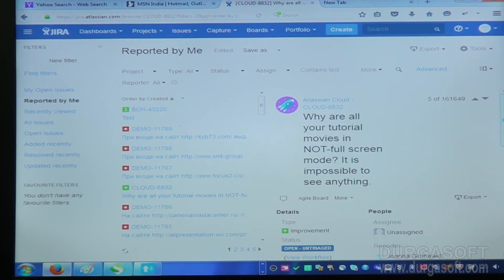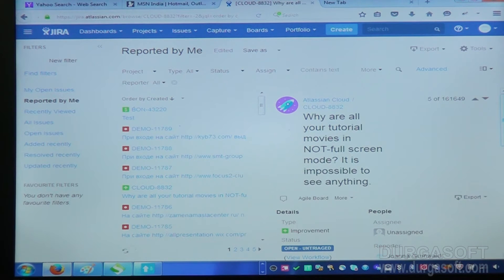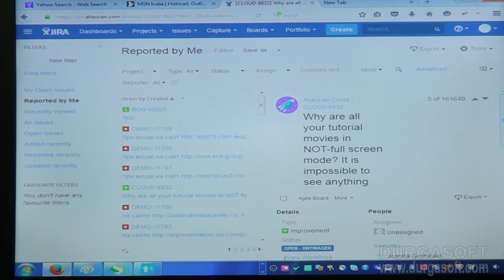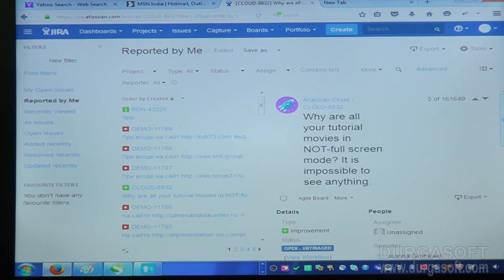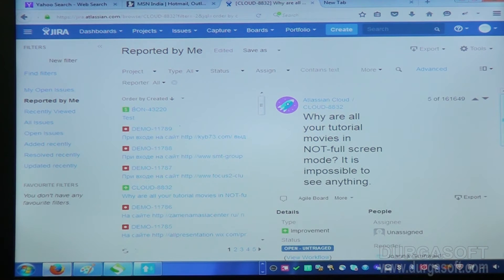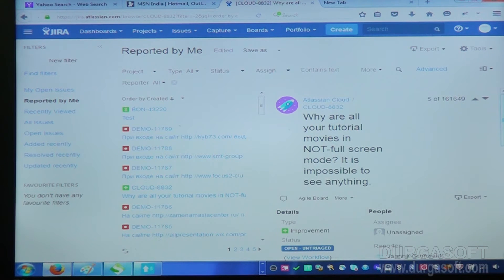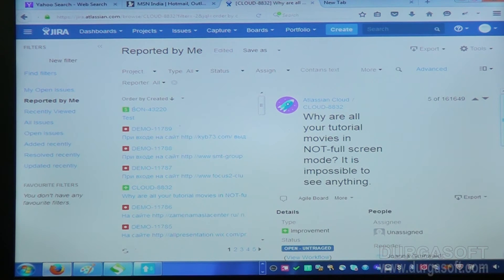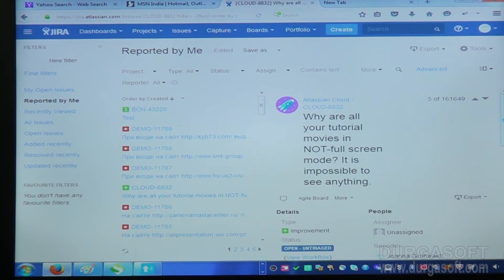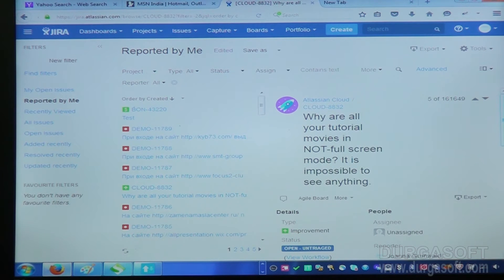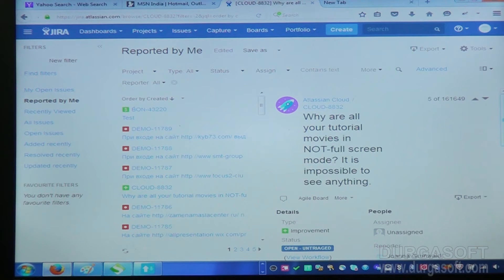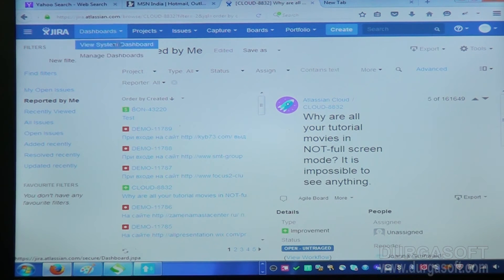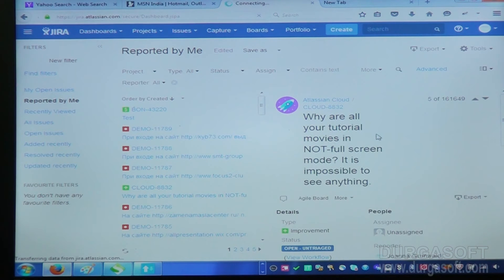So that defects your team leader will assign to you on your name. Suppose in your team 10 people is there. Some 100 defects raised by testing people, and team leader will split that defects like 100 defects for 10 people, for each person 10 defects. So what he will do is he will assign 10 defects on your name, and for each person, for each person he will assign 10 defects.